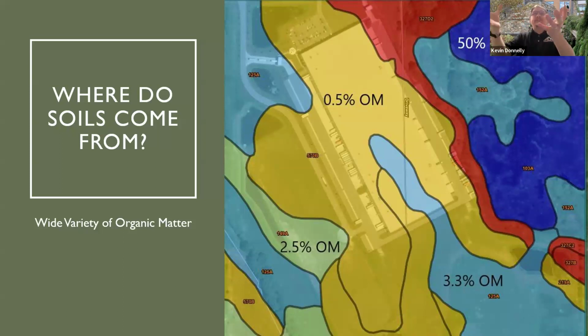And so that's just going to happen from time to time. Most fields are relatively consistent depending on the size, but that's why I check this to say, hey, if I've got a big project that's coming up where we're going to use soil from this field, do I run a risk of having this dramatic change in the consistency and in the characteristics of the soil we're working from? And it's just random, right? There happens to be a development of a suburb, a housing development or a warehouse development or whatever it happens to be where they're going to scrape up the topsoil. That's the luck of the draw on what happens to be available and when. And then once this material is gone, it's gone. It no longer exists. So you move on to the next field, into the next field, into the next field, and you're just kind of wondering what you're going to get.